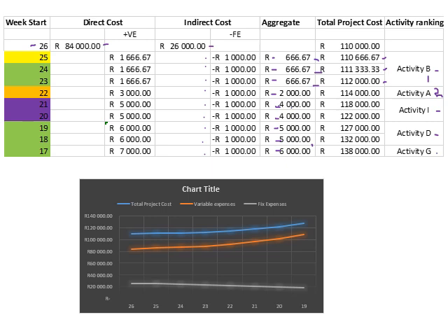In this case, my interpretation was it jumped from 666 to 2,000 Rand here, so there was a significant jump here, which was also led by the graph. So I could see on the graph there was a bit of a jump in this section. So my interpretation was that the optimum time before that jump was 23 weeks. So that's the optimum time for the project if you do not want a significant jump in the project.